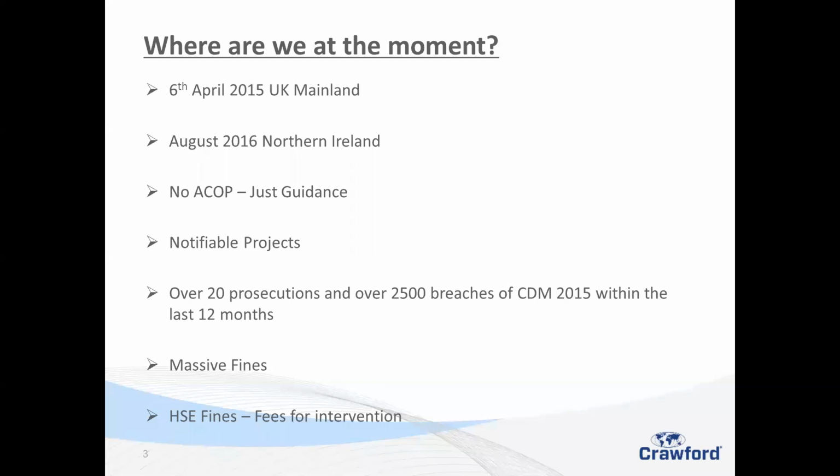Whereas in the industry I'm in, insurance refurbishment, we haven't got that luxury, unfortunately. Sometimes we have to look at working alongside the policyholder in their own house, with their families and their pets, and making agreements with them and making sure this is all outlined in what's known as a construction phase plan. That's something I concentrate a lot on from my point of view. I want to make sure that the contractor is doing what he's saying in his construction phase plan, and then we monitor it from there to ensure that they are actually doing it.